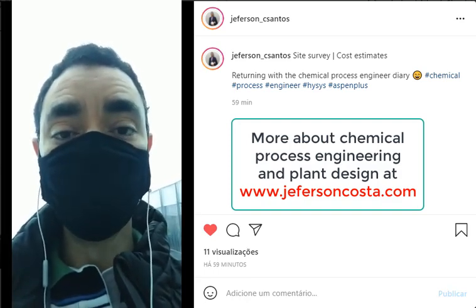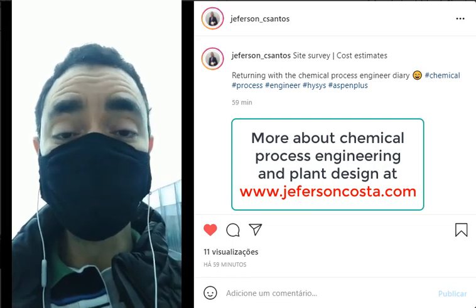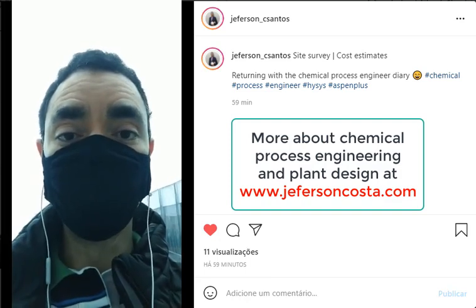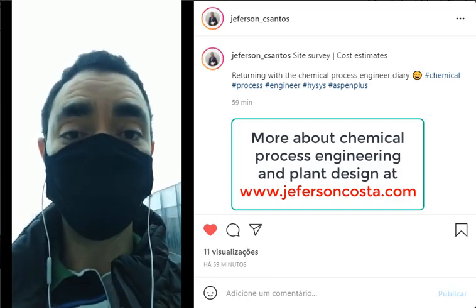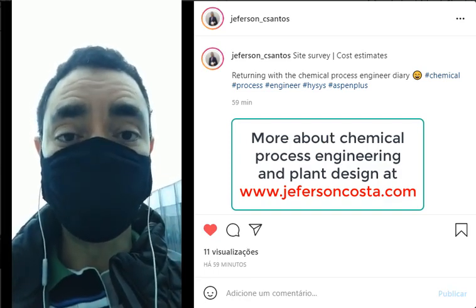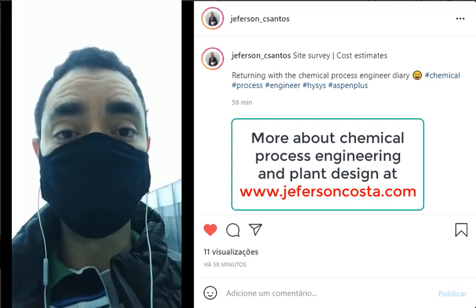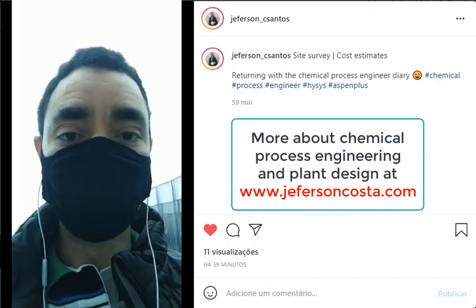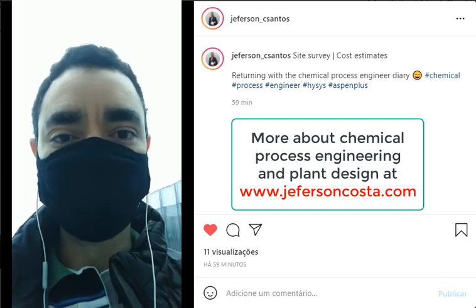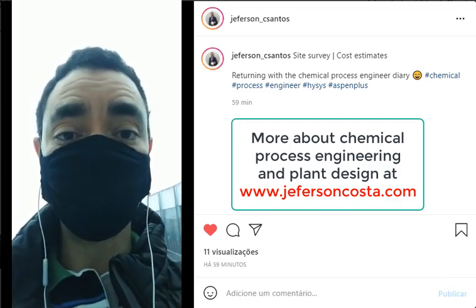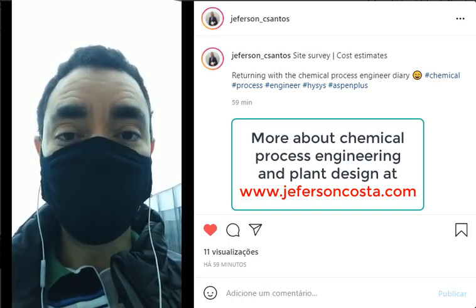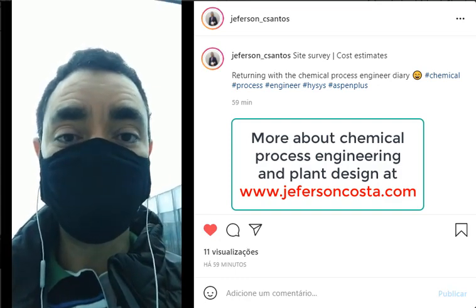Most often we use a data bank, and we do some kind of rating to verify the amount that should be spent on the project. For instance, I know that one hydrogen plant of 1,000 normal cubic meters per hour costs some $100,000, and I want to build a 5,000 normal cubic meter hydrogen plant.